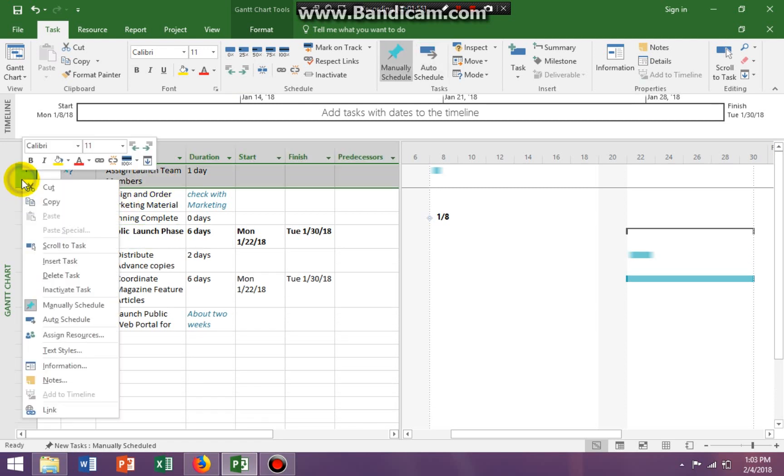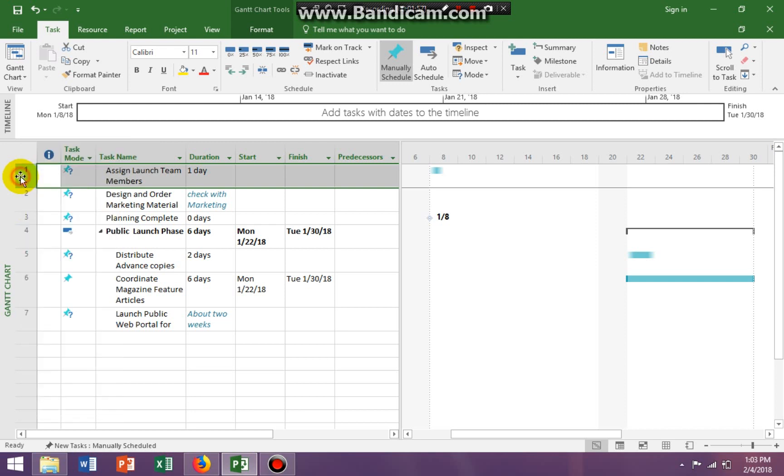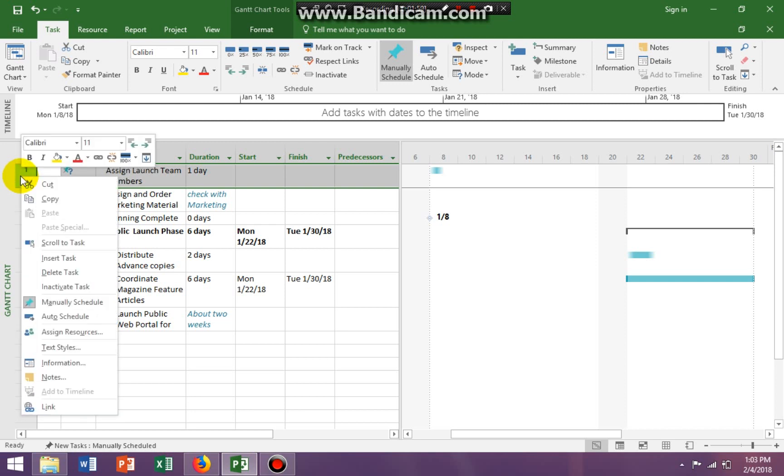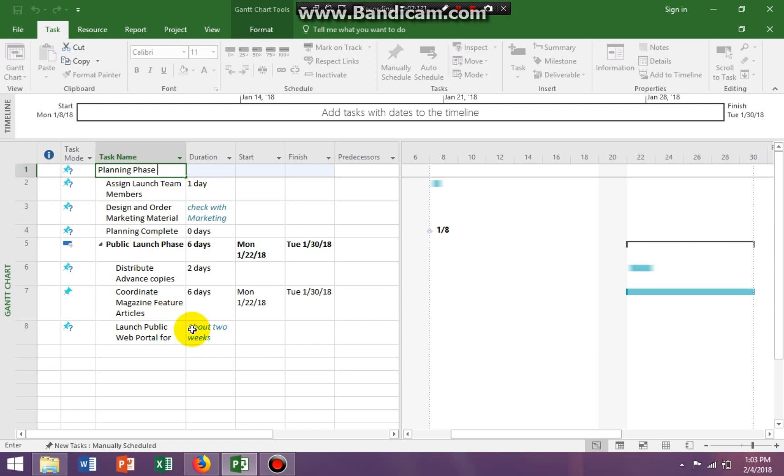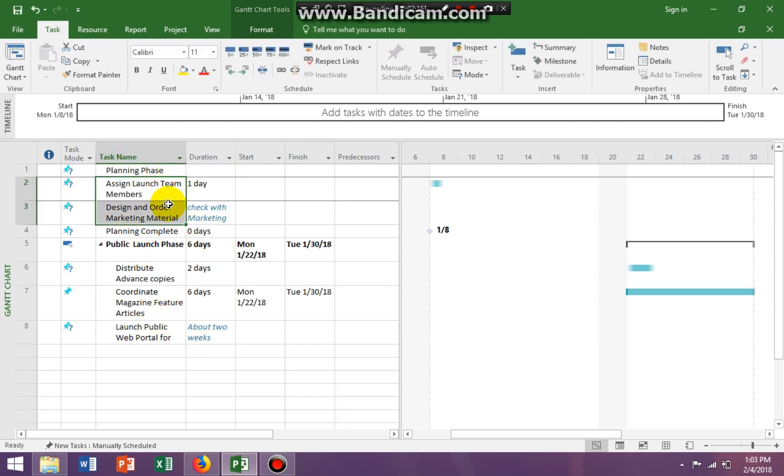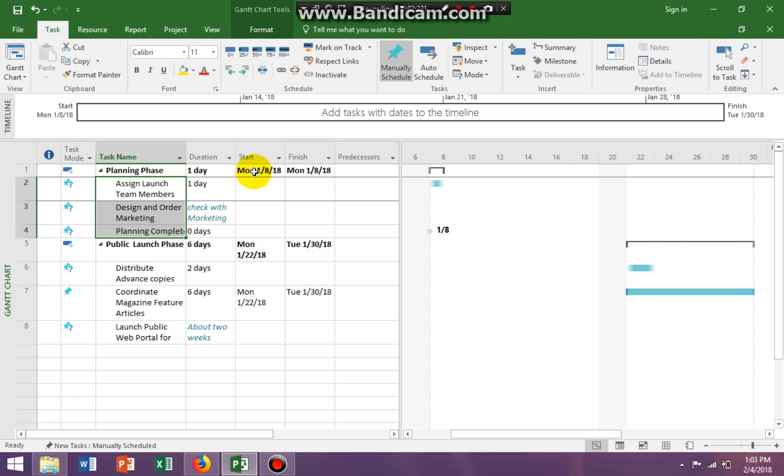Now I have to make a summary tab at the top. So in order for me to get space at the top, I'm going to right-click. And on my submenu, I'm clicking insert. So in the insert tab, I'm going to type in planning phase. And my planning phase is supposed to include tabs 2, 3, and 4 as a summary task. So I'm going to make sure it's a summary task. And so there you go.